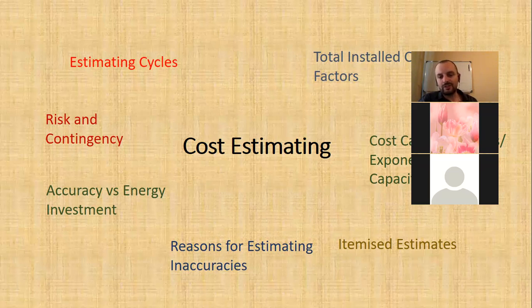And we looked at the most common kind of estimate in Kurdistan, which also has the potential to be the most accurate, and that is an itemized estimate. And we talked about different elements there, but one of the key reasons for inaccuracy with an itemized estimate is people missing line items that needed to be counted. That's the key reason. That's so for very big projects.